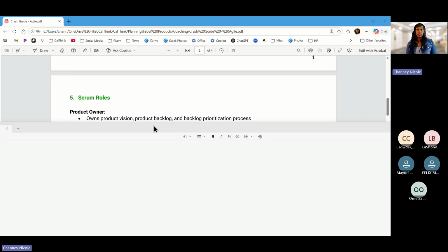The product owner owns the backlog and they prioritize it accordingly. It could be a backlog of 100 items. The product owner is responsible for prioritizing those items as often as possible, depending on what the need is for the customer at that time, or what the urgency is. It could be that we discovered a risk on the project and now we have to focus on that instead of building something for the software. So now the risk items have been prioritized over building the software piece. But all those decisions belong to the product owner.